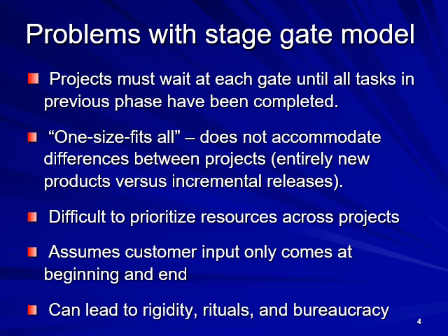And another difficulty of the process is that it doesn't tell you anything about how resources should be allocated across projects. The only thing that it tells you is what each project needs to do to be successful. So from a management perspective, it doesn't give you the tools so that you can actually allocate resources efficiently.